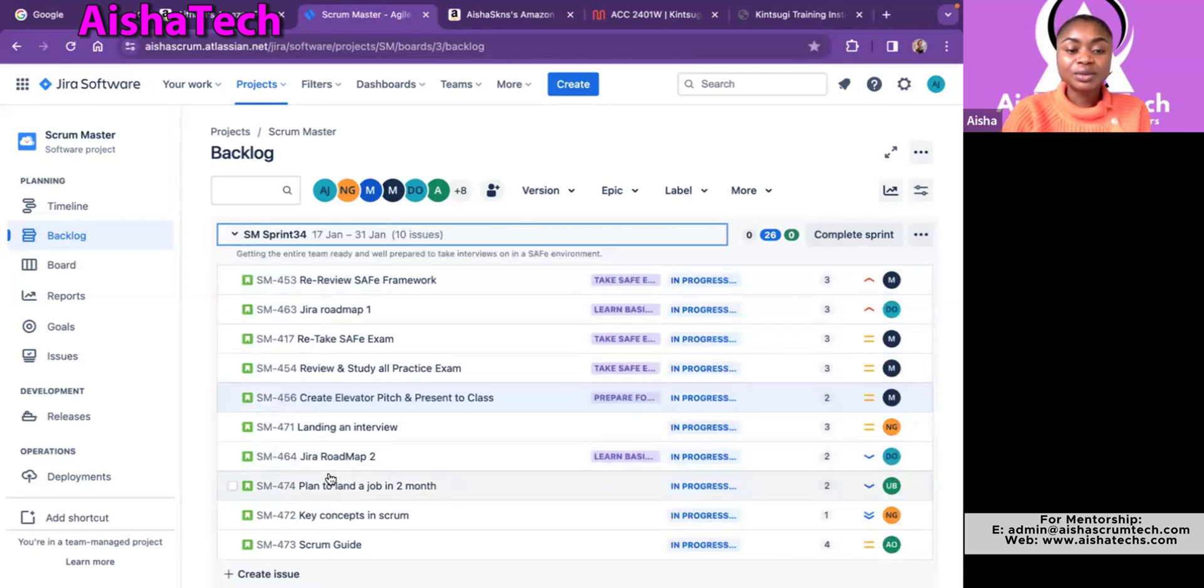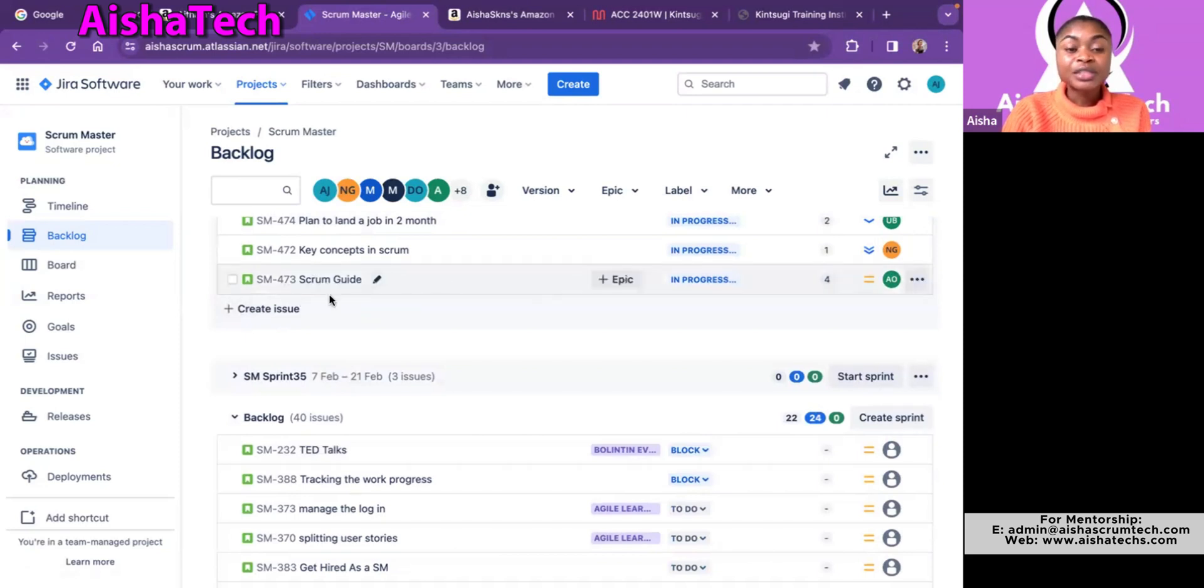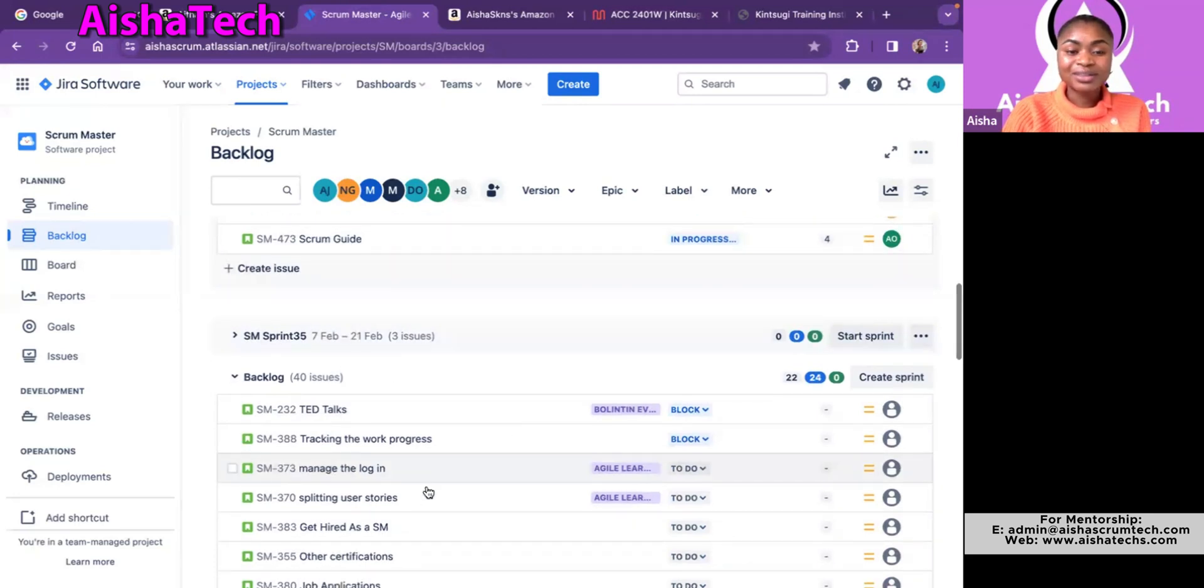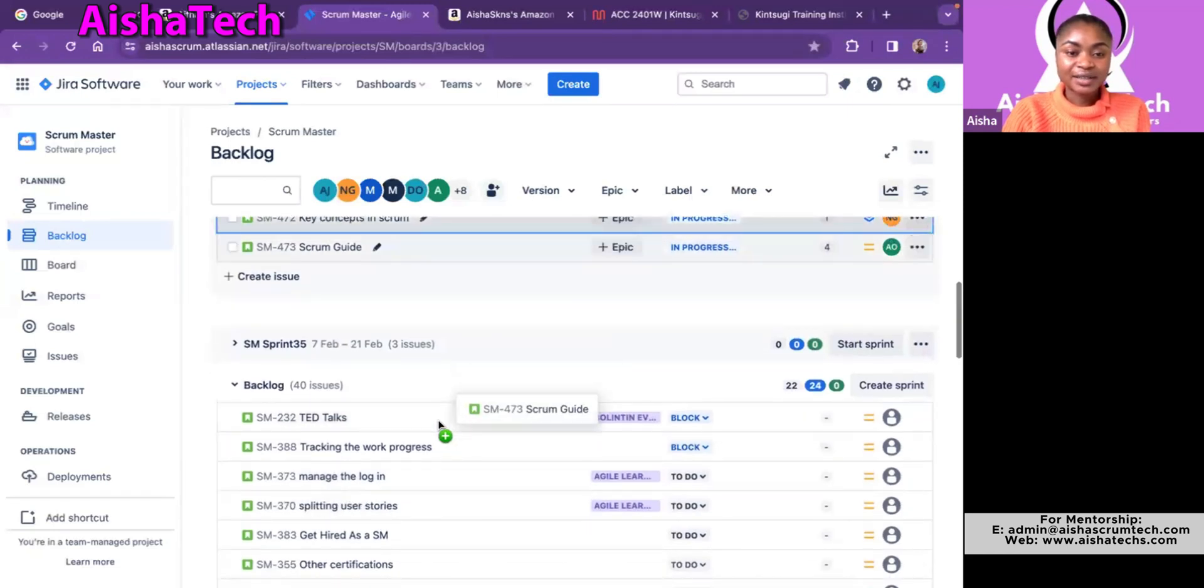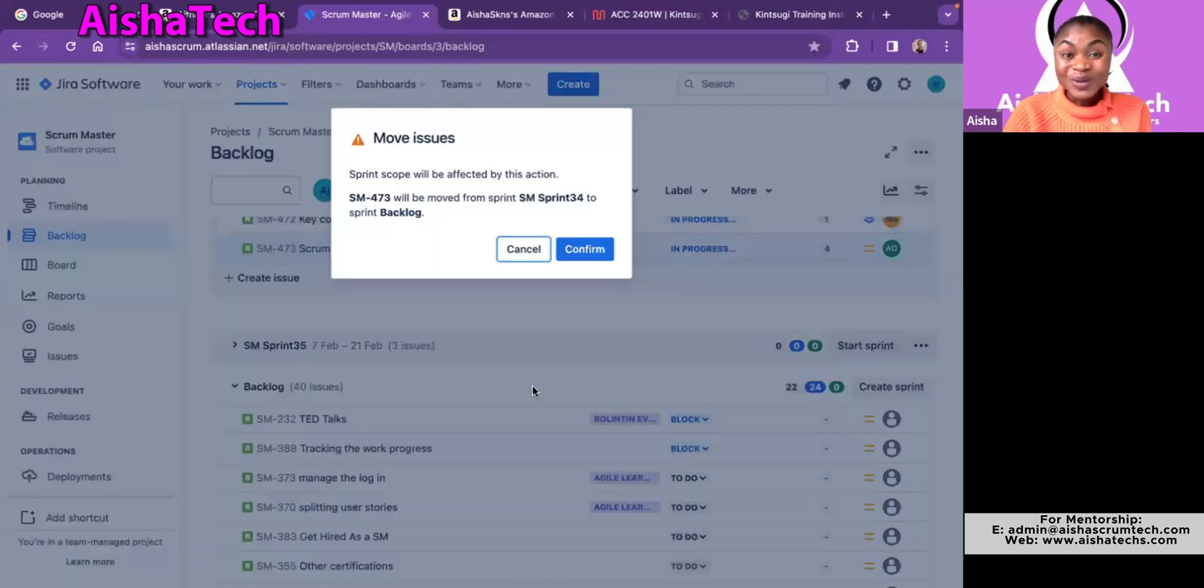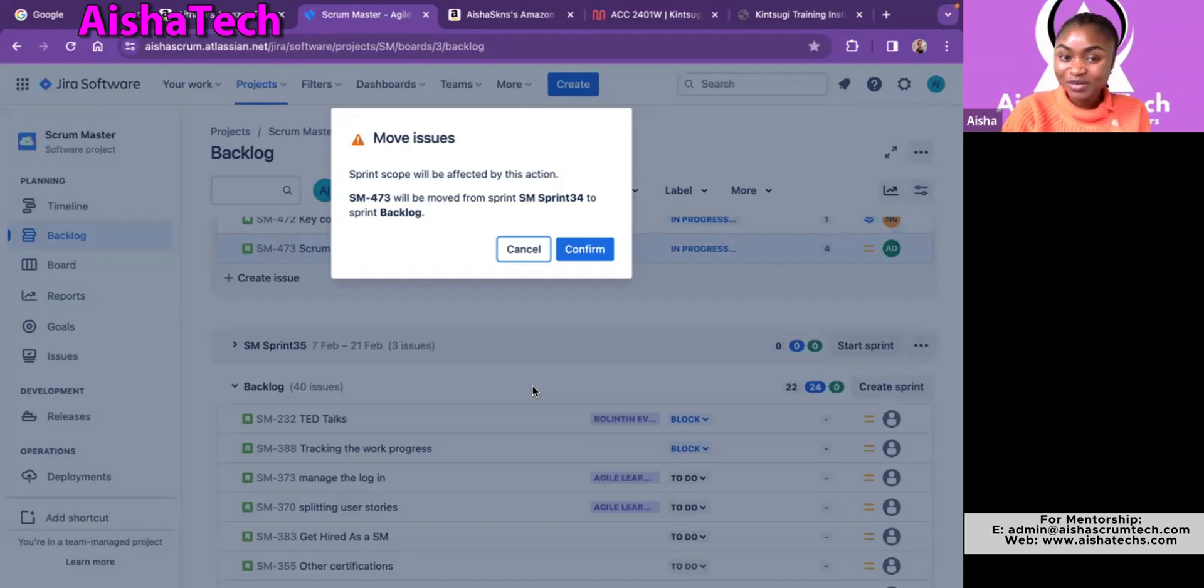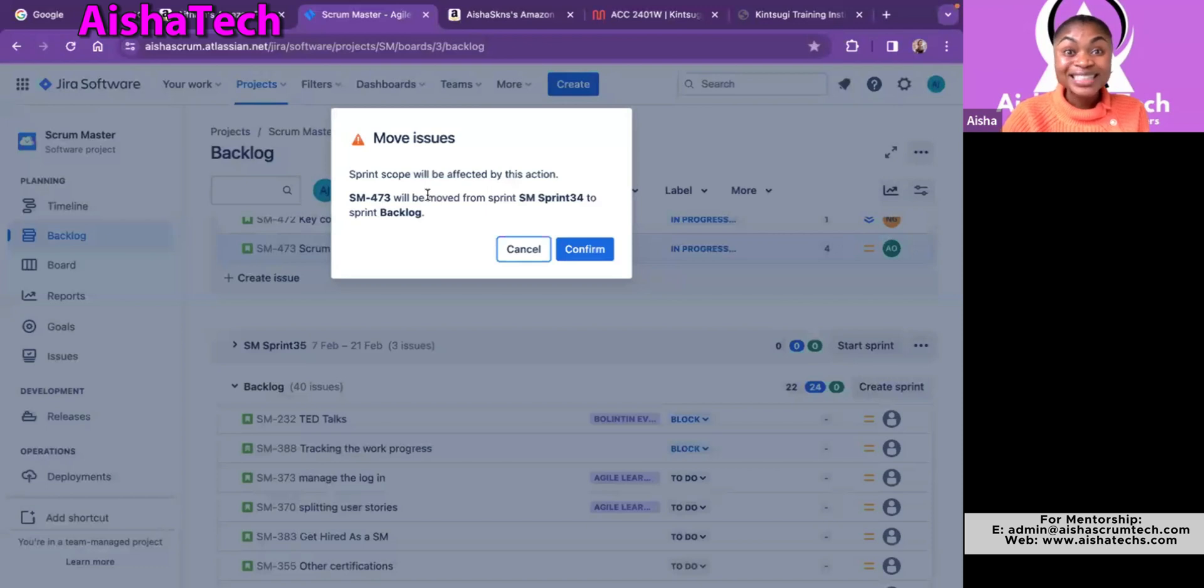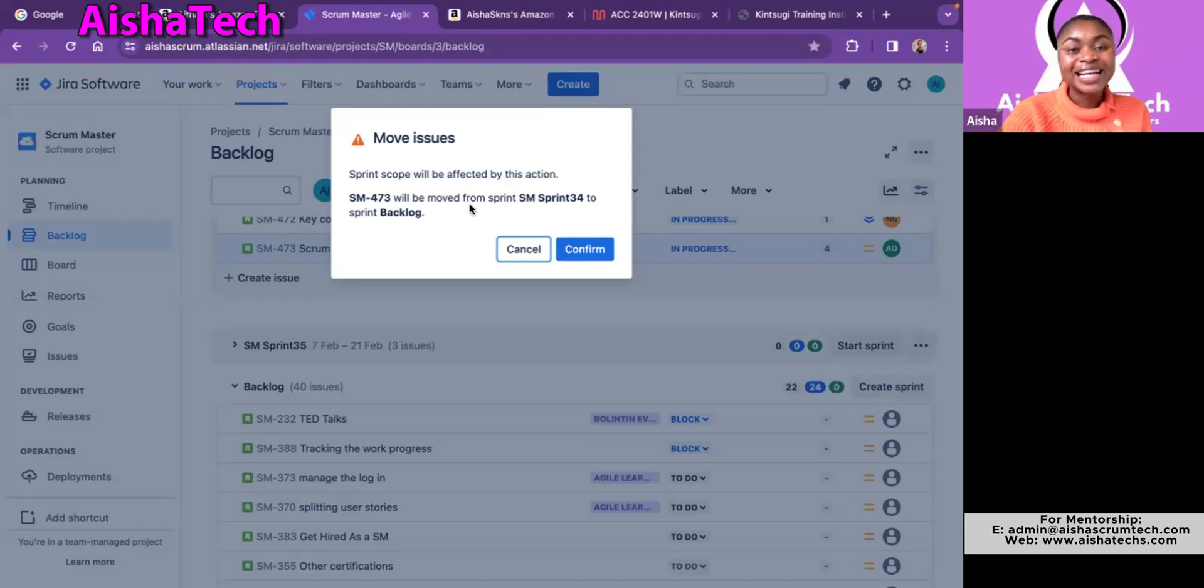So now let me open this current active sprint. And let's say I want to pull the story 473, which says scrum guide. Let me pull the story from the sprint backlog to the product backlog. So it's as easy as click and drag. And as always, when you pull in a story from an active sprint to any other backlog outside of the active sprint, Jira will always give you warning. Because why is that? You've already planned during the initial sprint planning that you were going to complete all of these tasks. And now midway or after the sprint already started, you want to pull something out.